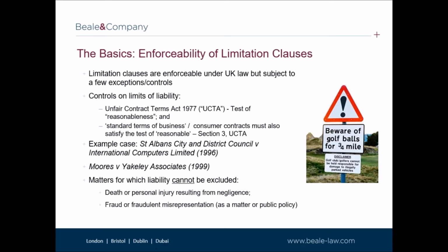This was based on overall circumstances, namely the fees were in the order of £20,000, the cost of the works, the fact that the client was in a stronger bargaining position and had greater resources than the architect, and that the client had been aware of and had a chance to object to the clause.